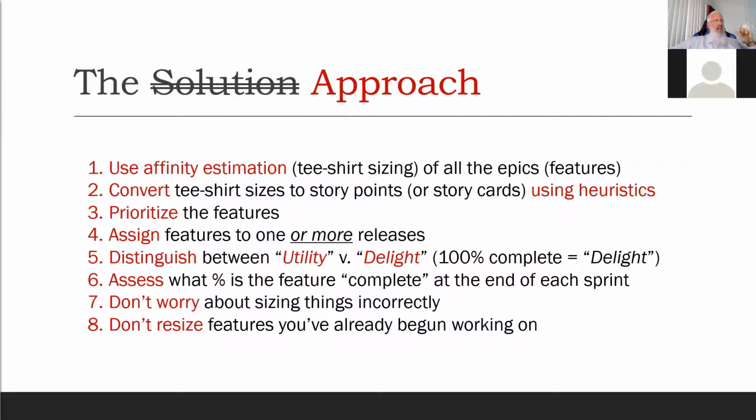Sometimes you look at a thing and say, it's small, but it turned out to be bigger than small. Sometimes you'll say, well, I think this is going to be huge. And then when you get to that point, you're like, when we negotiated with the product owner, it's actually not so big. I kind of rely on what in statistics is the central limit theorem. Sometimes you think something is easy and it's harder than you thought. And sometimes you think this thing's going to be a beast, and then when you get into it, you find better ways of solving the problem. And it's not so bad after all. And so one kind of washes out the other.